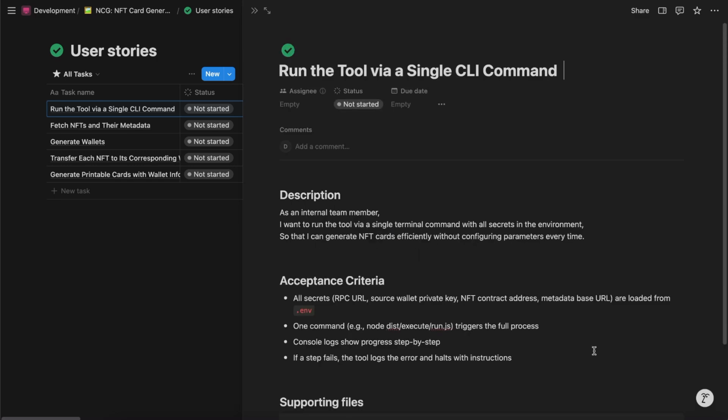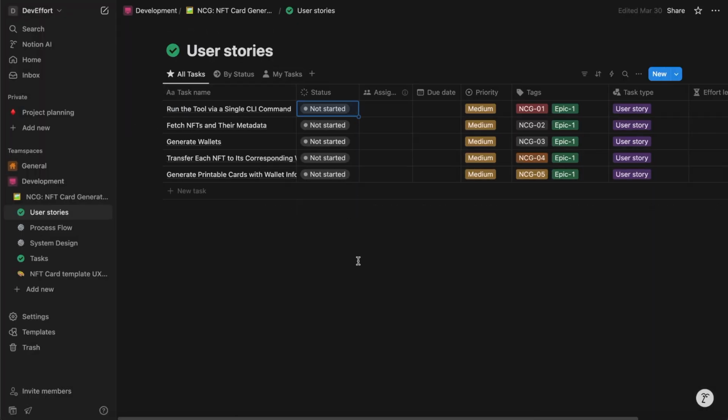And the acceptance criteria is usually where business rules get defined and should be strictly adhered to. In my case, I made it a bit more technical for me to just outline the things that I need to do and also what I feel like this journey or this story should accomplish. But when the developers are done with either their subtasks or the story itself, they would actually go and push it to testing, and then testers will actually tell them if they've met the criteria or not, based on if it's a technical thing they can check or an actual non-technical process.